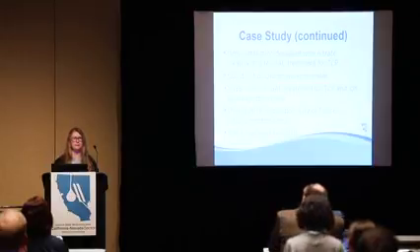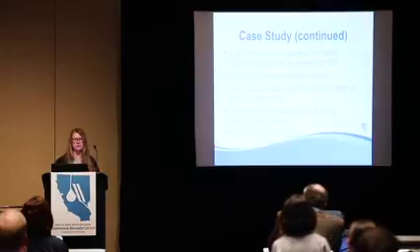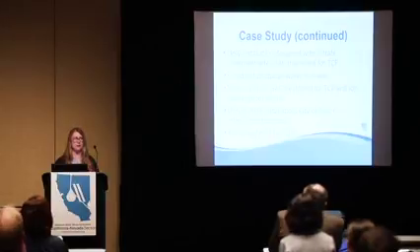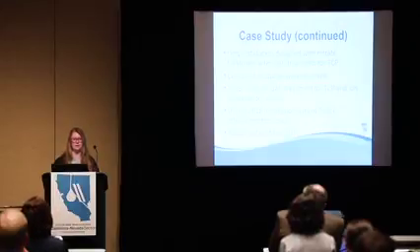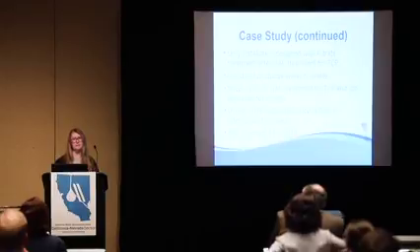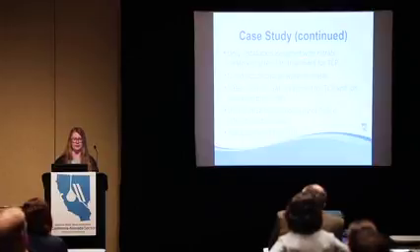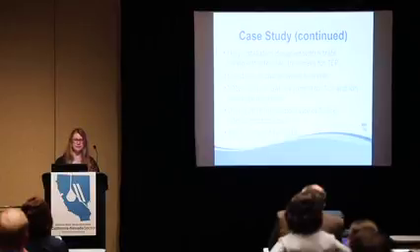One other thing that was really important to us in this installation was the use of an emergency interconnection with the city of Tulare. As this was our only source out there, during the time when we had to shut down for the connection and for the construction process, we relied upon the city of Tulare. Because of the challenges we had with that, it has allowed us to justify putting another well out there. So we're eventually going to add a secondary backup well. And then we ran the system with compliant water in May of 2018.